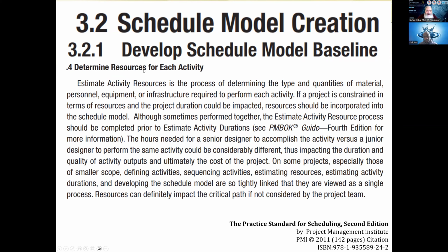Then we talk about determining the resources for each activity. How much resources are required for each activity? Naturally, this is specific to whatever kind of job you're doing. It is the process of determining the type and quantities of materials, personnel, equipment, and infrastructure required to perform each activity. Each activity, not the whole project.